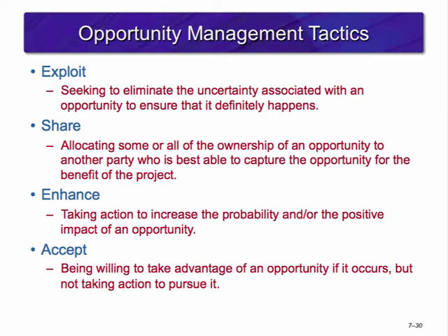The project management profession has identified 4 different types of response to an opportunity. First, exploit. This response seeks an opportunity to ensure that it definitely happens. An example would be changing a design to allow a component to be purchased rather than built internally. Second, share. This involves sharing the ownership of an opportunity with another party who is best able to capture the opportunity for the benefit of the project. An example of this would be a joint venture.